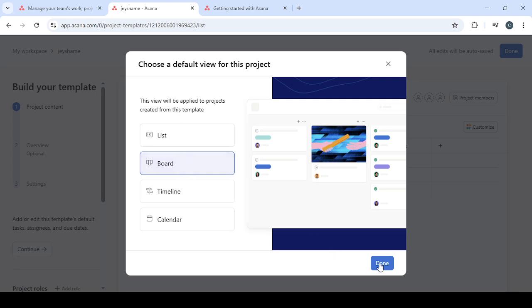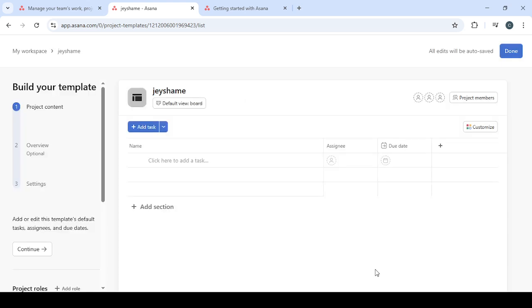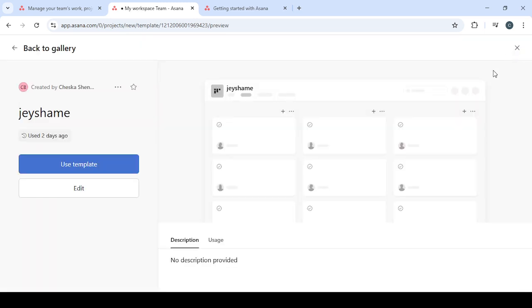With the project created, define your core sections: backlog, to-do, in progress, and done. Backlog is your parking lot for potential work. To-do holds only the tasks you've selected for this sprint. In progress is where active work lives, and done is your source of truth for completed outcomes. Keeping these four states tight and unambiguous prevents status drift and confusion.